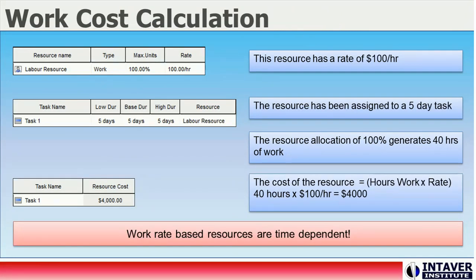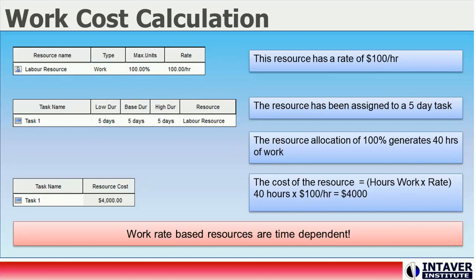Work is the fundamental unit of the time-dependent cost calculation, and is a function of the resource allocation. Resource units indicate the level of allocation, or the percent of the activity duration that the resource will be working on an activity. For this discussion, we are using the commonly used fixed unit task type, which keeps resource allocations fixed and recalculates work if duration is modified. In this example, we can see how the base cost for a resource assigned to a task is calculated. If we lowered the max units to 50%, the work performed by the resource over the same period would be reduced to 20 hours at a cost of $2,000. If the duration changes, work and therefore resource costs are adjusted accordingly — allowing resources to model time-dependent costs.